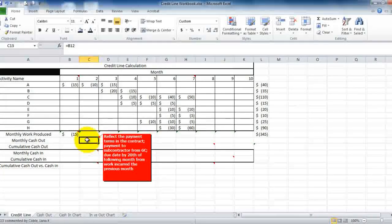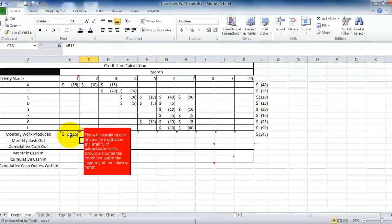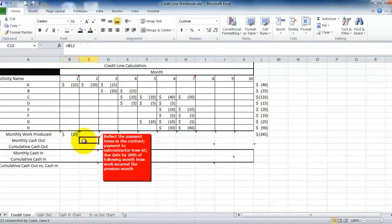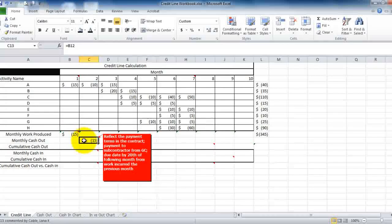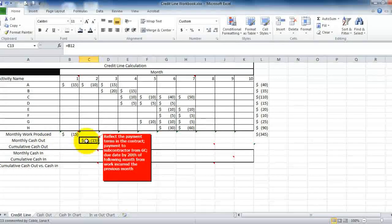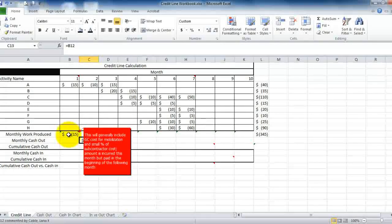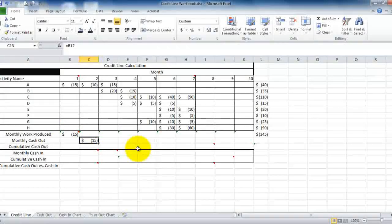Here you can see the row called monthly cash out. What happens with the general contractor is you're producing, let's say, $15,000 worth of work in the first month. At the end of the month you're complete with that period of work. You then turn around and pay your employees, your vendors, and any subcontractors associated with the scope of work incurred the month previous. So your payments are always going to be lagging behind by a month.